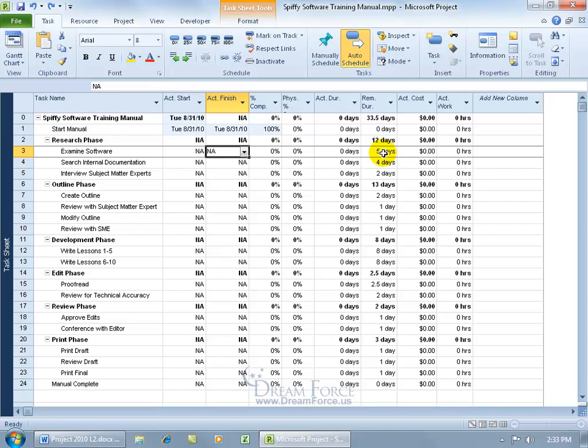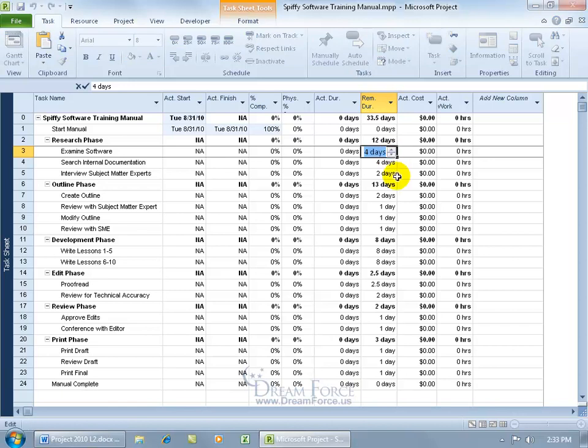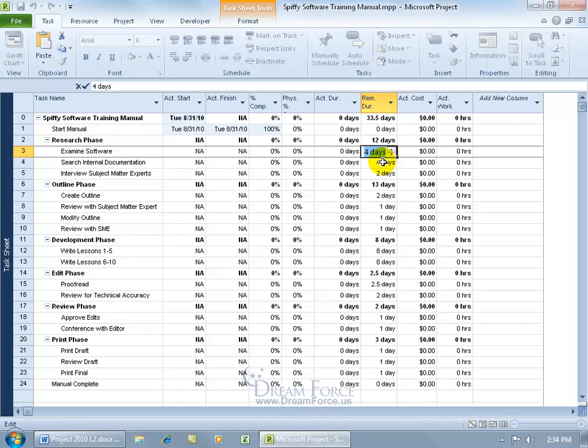Now, let me go ahead and undo that. So, if you just use the remaining duration field as a reference, you're fine. But if you come in here thinking that, actually, we're this percent complete through the task, and say, this is how much we have remaining. Don't do it, because if you do, you're going to update the plan. Now, the plan for the task examine software is five days. When I do it this way, and I actually adjust the days within the remaining duration field, I'm updating the plan. I just say, don't mess with it, just use it as a reference unless you actually intend to update the duration.